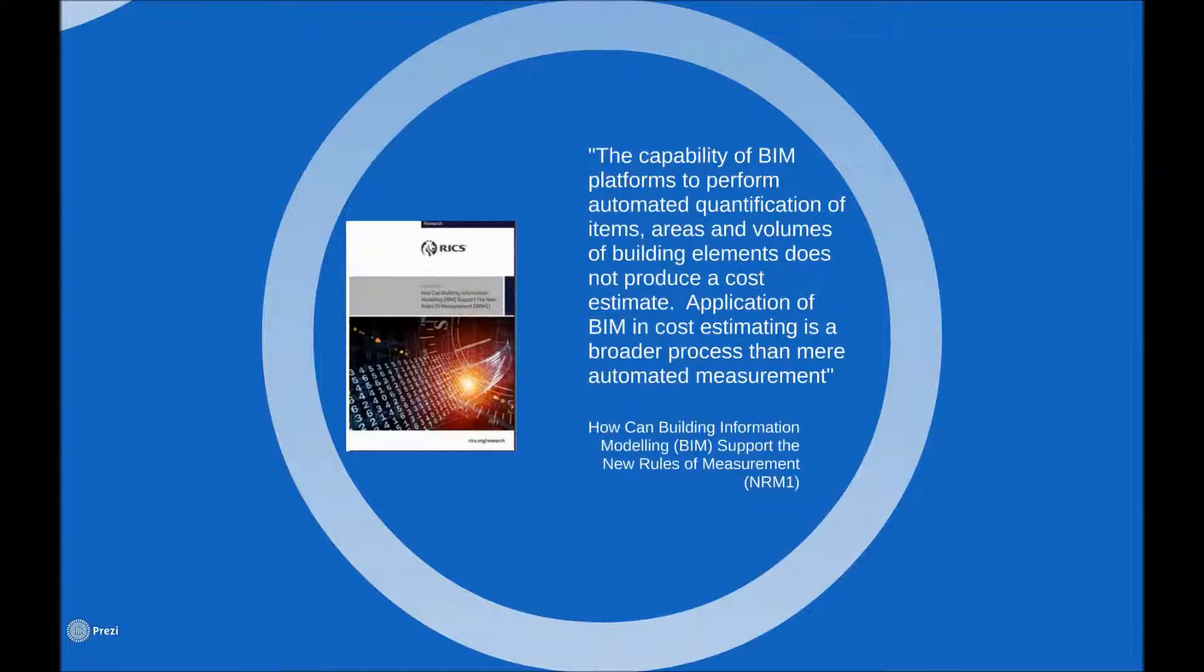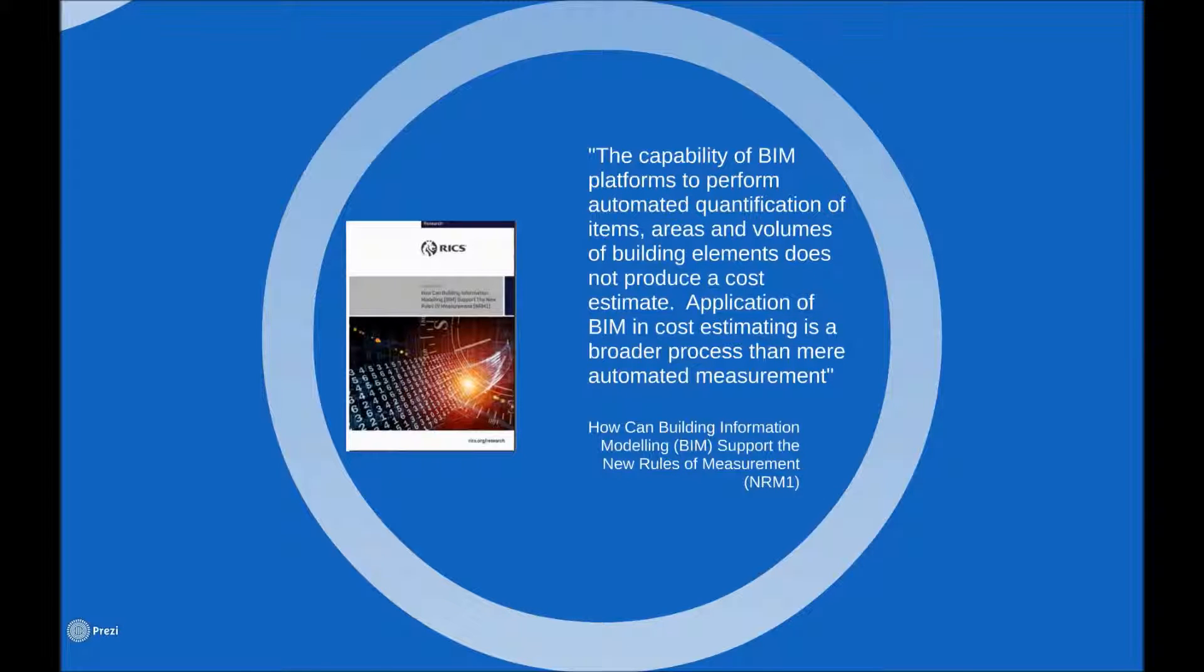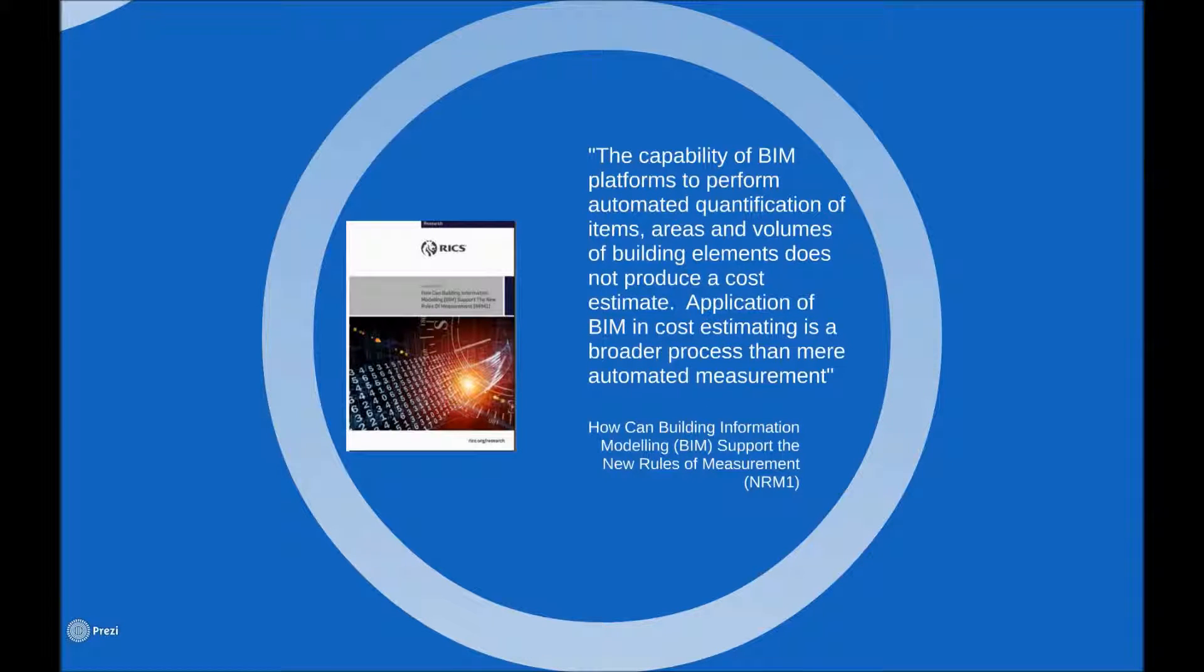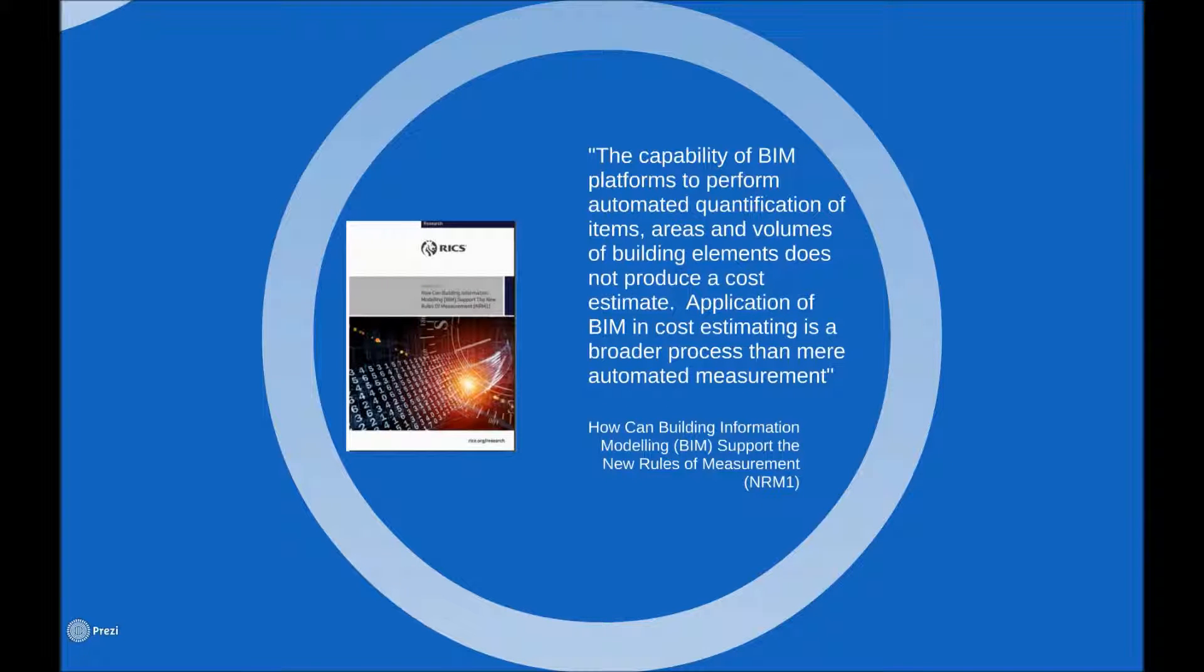The capability of BIM platforms to perform automated quantification of items, areas and volumes of building elements does not produce a cost estimate. Application of BIM in cost estimating is a broader process than mere automated measurement. This quote highlights the continuing importance of the QS's role in the commercial management of BIM projects and helps to dispel the perception that automated quantity extraction in itself does away with the need for proper cost control in BIM projects.